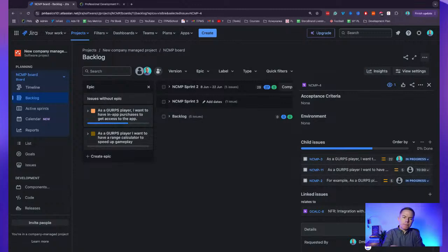So if you combine these two concepts together, what you get is that from one side, you can start organizing all your work by deliverables or business needs in terms of epics, then break it down into user stories. And then you can plan all this work into releases. And after you assign a certain amount of sprints into each release,